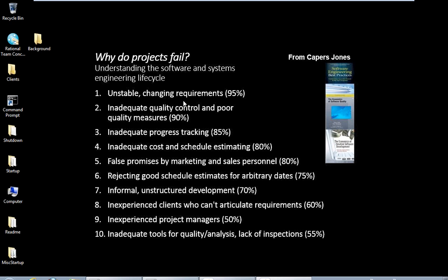So it's quite useful. If I go back to the planned time view, this is quite similar to the work breakdown view we saw earlier, but we're showing load. This is how much time we've got within this particular plan period. So if I take an unassigned task like this one here, to test the infusion pump parameters, and drag it to Tony, you can see his load went up.